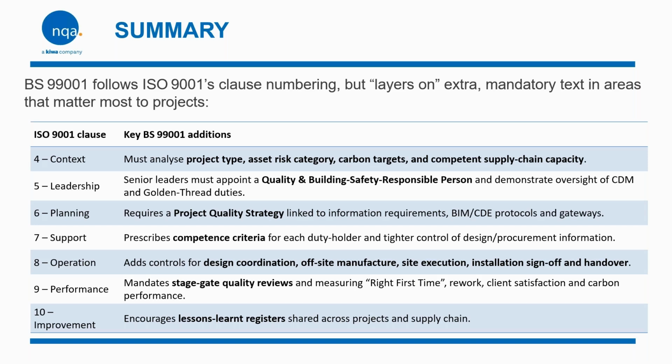99001 also introduces stage gate quality reviews. So you're looking at checkpoints where you can pause, review quality outcomes, and prevent defects from carrying forward. Then under